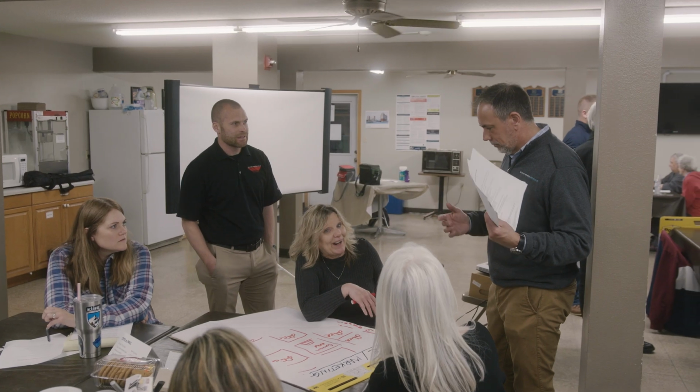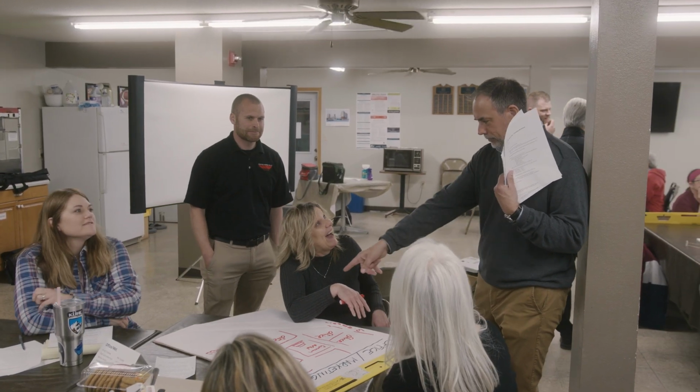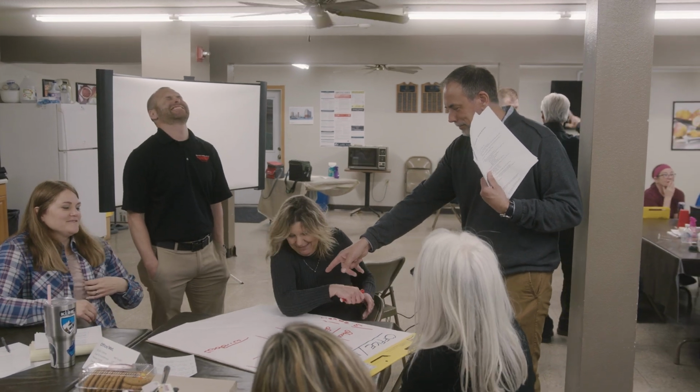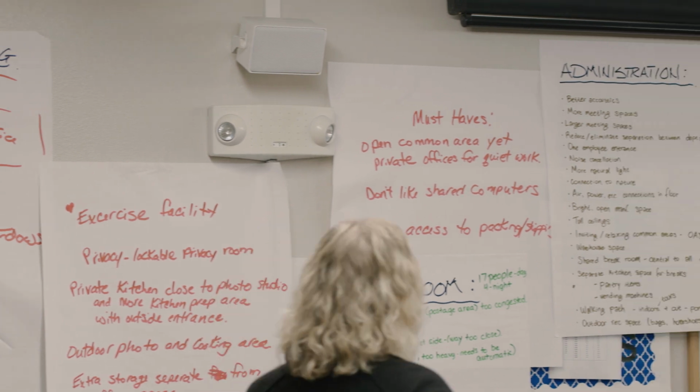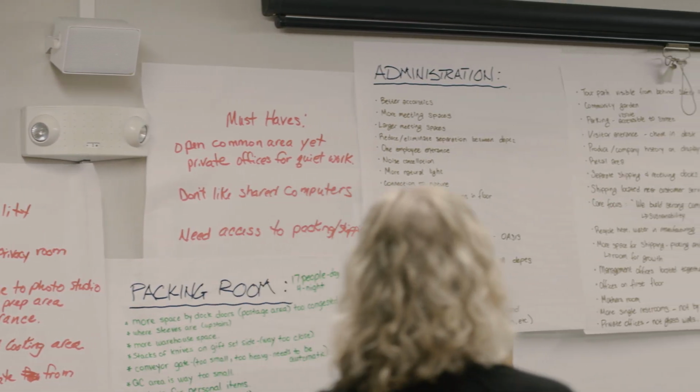Pre-design meetings usually involve a larger group of stakeholders. Depending on your project, your architect may host programming workshops, visioning workshops, and benchmarking tours. These workshops are an opportunity for your architect to meet with people from all areas of your team to learn about their needs. The ideas discussed in these workshops will form the beginning foundations of the design. These pre-design workshops are crucial to a successful project. Although these meetings are infrequent, they may require extra planning to coordinate a larger group.